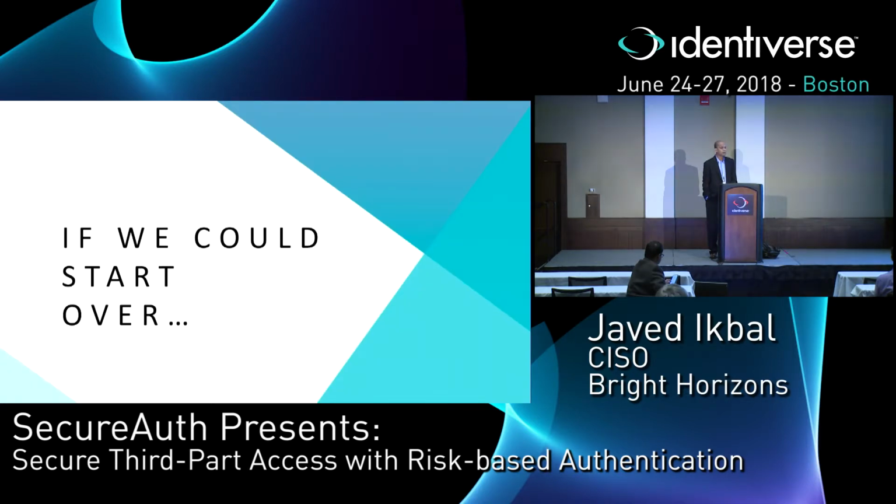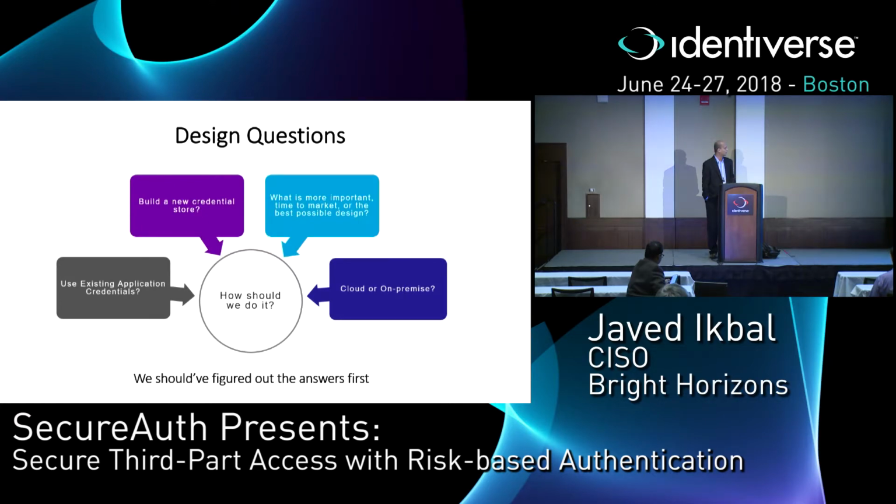This is the lessons learned phase of the presentation, mistakes that we made that I hope you guys will not make. We didn't know that these questions were going to be relevant. We have 4 separate credential stores, 4 applications that our clients were using, plus Active Directory for our own internal users. And the question came up: one, should we build this as a new credential store and migrate all the existing credentials to the new one? Or are we going to use the existing credentials? And it's a very important user experience question.